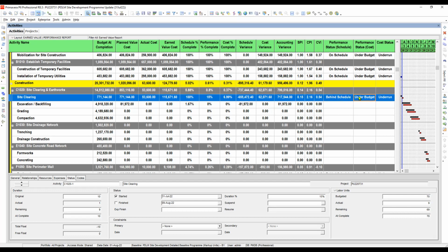Okay. So what formula shall we be using here? We will be using the CPI, which is under technique number 2. Okay. So if you look at here, I will show to you. When we assign the technique, we will be going to WBS. Let's open first our WBS.